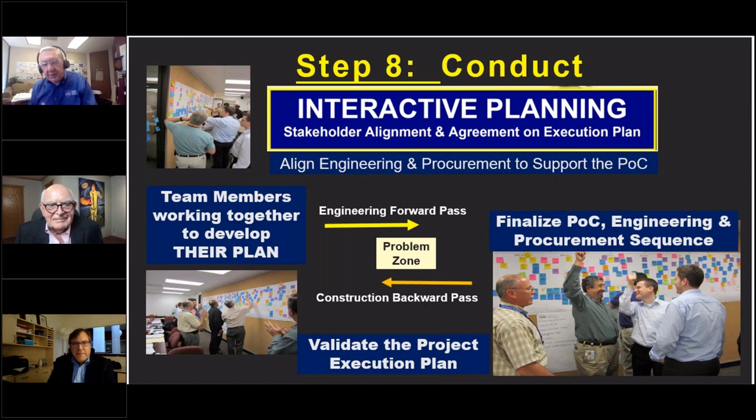Just like Dan said, you start out with milestone planning. Over here is startup. Over here is mobilization. Over here is, you got those. Here's funding. There's some key milestones that are going to hold you up in the contract. You put those on the board, and now everybody's got to start putting their stickies.